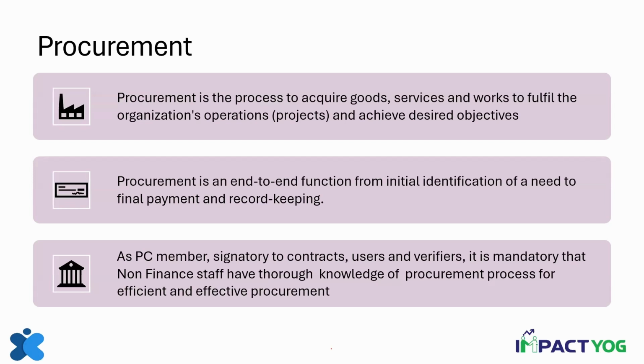If I were to ask for an agri product, some kind of solar irrigation product, and the product came very different from your requirement in the field, then that entire procurement goes to waste, because you cannot go to the vendor and say we did not order it. You ordered it, but the product is wrong because you were not actively participating in the procurement process.